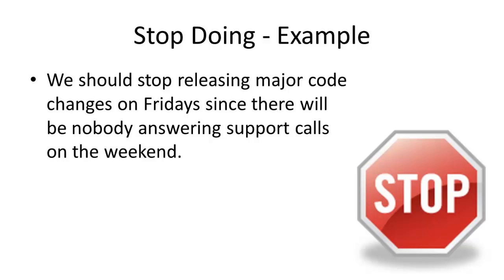Here's an example of a stop doing that could come up at a retrospective. If you're working in a software-as-a-service environment where a development team works Monday through Friday, it's not a good idea to push code changes to the live system on a Friday. The developers work the week, go home for the weekend, and then the IT team is on the hook for the weekend to sort out what goes wrong. The IT team doesn't always know what's going on with the code changes, and they're stuck sorting it out. Shifting code deploys to Monday instead means Mondays get a bit more code to release than usual, but it provides the highest quality service for customers.